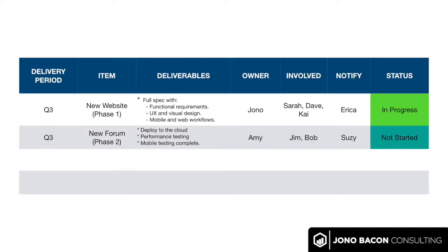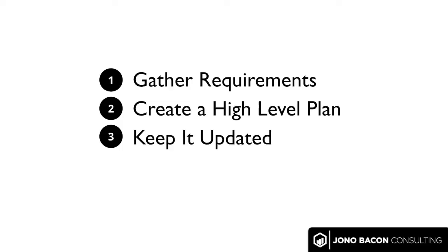And what I mean by that is another column you should have in this, I tend to do this in a spreadsheet, is going to be around status. Now, you'll have different types here, like it's not started, it's in progress, it's being reviewed, or it's blocked, there's something holding it up, it's being postponed, or it's complete, okay? And what you'll do is on a weekly basis, you'll make sure that that status column is current.